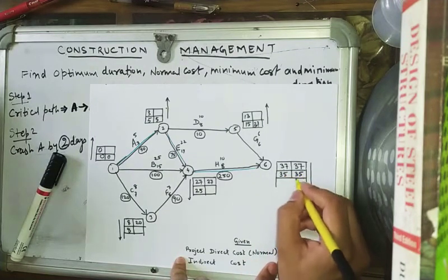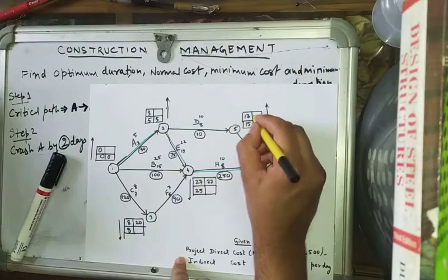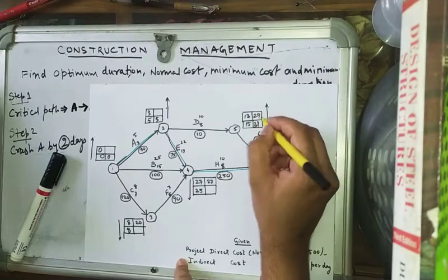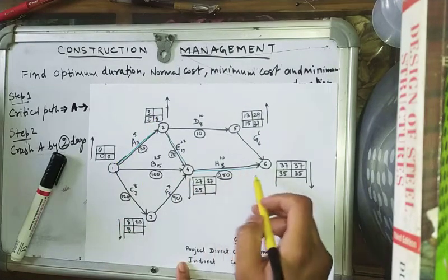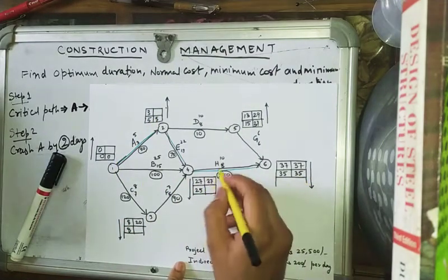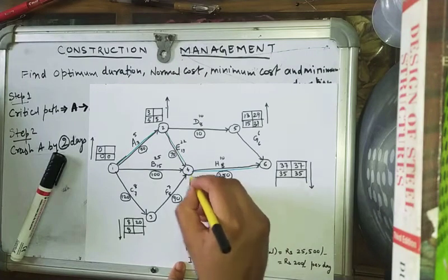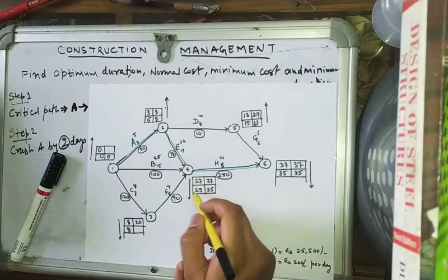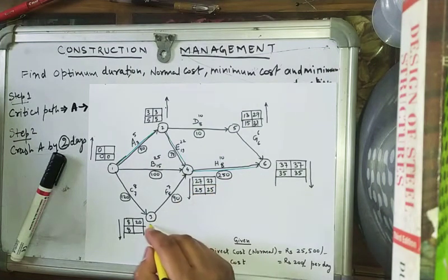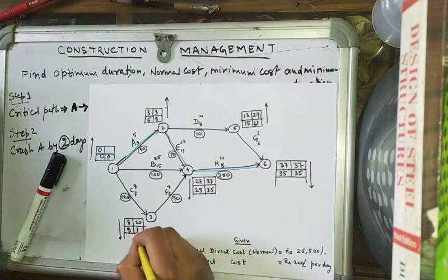We will calculate the LOTs. 35 minus 6 is now 29. 29 minus 10 is 19, but we'll see that 35 minus 10 is 25. 25 minus 22 is 3. 25 minus 7 is 18.